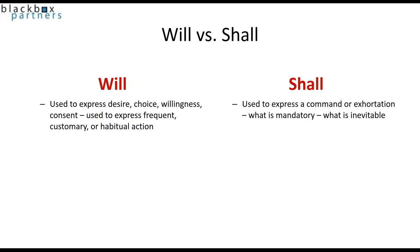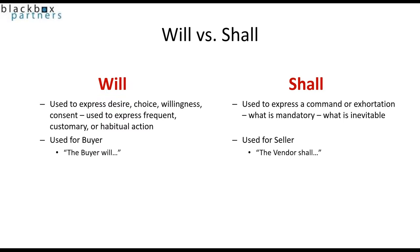In writing a contract, since the buyer is the one paying, the buyer ought to be the writer of the contract, and the buyer will say about themselves, 'the buyer will.' The vendor or the seller will be prescribed and restricted by the contract that the buyer writes, and the buyer writes the language for the seller that says, 'the vendor shall.'